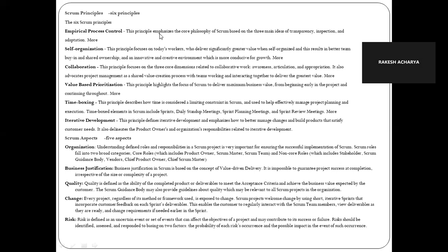See, John, generally what happens in waterfall, your team member will always wait for the technical lead or management to explain what to do next, right? What I will deliver today, I might have completed my task, what I can pick up. No. Agile is saying you no need to ask this question. You know what the client is expecting or your product owner has asked you to develop, because that is in your backlog list. So if you have completed your one work, no need to ask. Go check that particular list and pick up the next item by your own. So that is the self-organization.